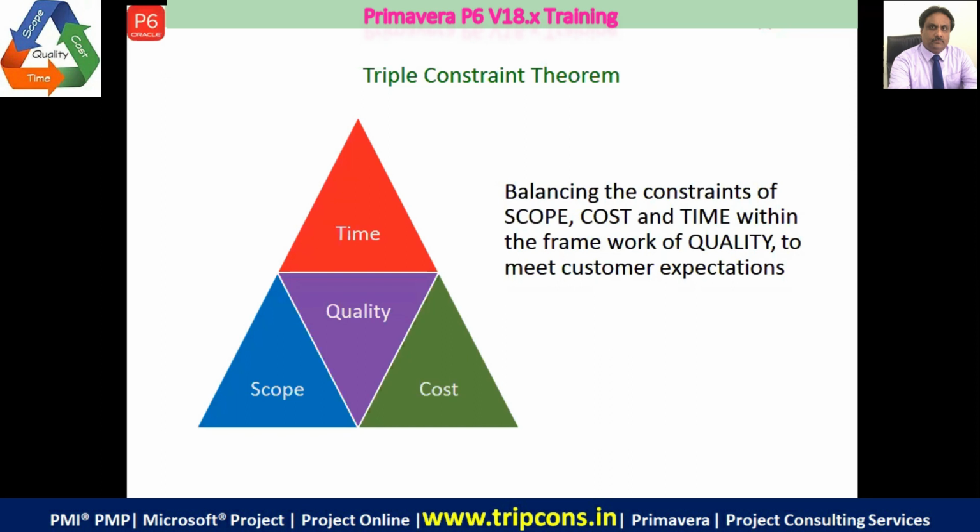There should be some separate team of people who will be watching the quality of the material. They'll be watching the quality of the workmanship. They'll be doing unit testing. They'll be doing integration testing. They'll be doing regression testing. So their time will be called the quality cost. Without spending the quality cost, we cannot achieve satisfaction of the client.